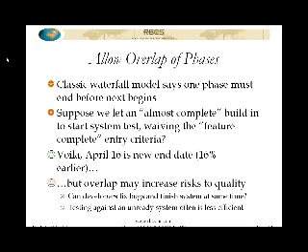It happens a lot. So we have to think about this, that if the developers are having to fix bugs and finish the system at the same time, there's a substantial number of bugs, then that could push out the date on which the system is finished, which ultimately might slide out enough that it actually destroys any benefit that we got from starting earlier, potentially.